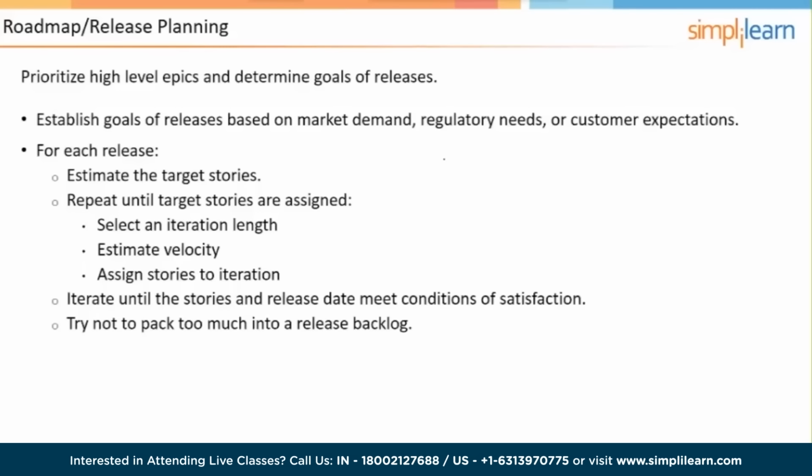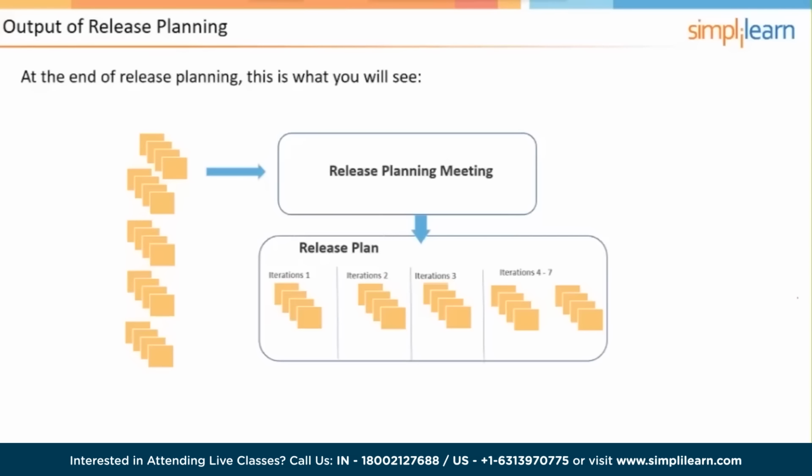Okay, so here's a bit more about release planning on this slide here. You've got the product backlog here on the left, and then we might come up with a release plan, which could be flipped and could be looked at horizontally. And you probably plan about 3 releases in advance, or at least you're doing more of the detailed planning on that, because things are going to emerge when we do sprint 1 that's going to help in sprint 2, and things that happen in sprints 1 and 2 that are going to help release 3. And then you've got your subsequent releases where we're just doing very high-level planning.